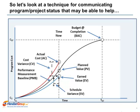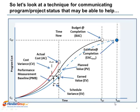Using variance and some indexes, one can estimate duration to complete and arrive at a value for estimate at completion for time or duration. Graphically, the way to think about estimate at completion for time is the point in time when earned value equals the budget at completion.